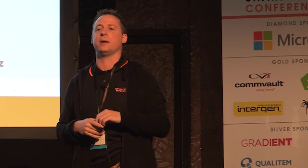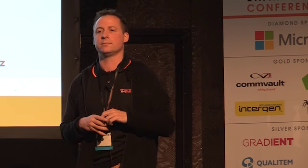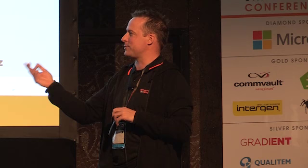Yeah, in the content type hub, so it actually pushes it out. Yes, it did initially, because we defined the content types and that's what we built. And then when we deployed it, people changed their mind. Because of this iterative process of doing something and then seeing what happens, we did have to do updates to content types. But we have a dev, UAT and production environment, and we spent a lot of time in UAT getting that right, and we didn't deploy anything to production until it was ready to go.